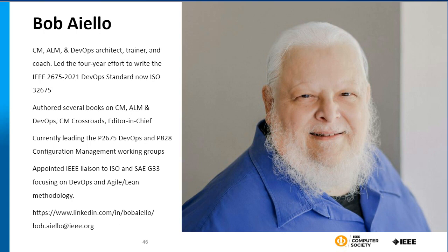Okay, so when we write a system, most big companies, particularly if it's a complicated system and I'm giving you $10 million to do it, I'm not just going to let you go off and build whatever you want. You have to write requirements and tell me what the system is going to do. I remember one time I did this at the New York Stock Exchange, and I got the sense that the business end user defining the requirements wasn't really communicating well with the technology folks who were writing the code. So I challenged that guy to meet with me for an hour and write test cases, simply write what they wanted to test and what they expected the results to be.